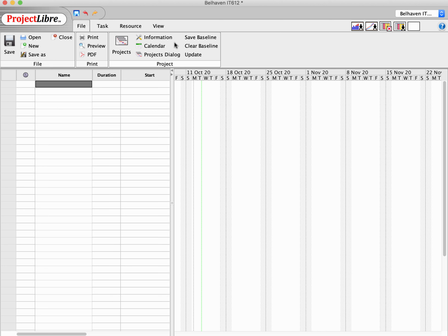Unfortunately, they had to order a new laser, and it was a custom laser device. So it took some extra time. Well, that's going to affect the plan. And so what they did was, instead of creating a second task for laser, they extended the first one. And of course, now the plan's changed. So the baseline saves it the way it was, and now we have a plan that shows us what the difference is.